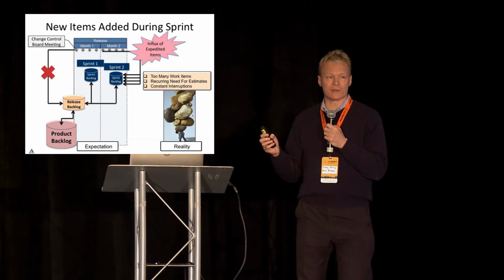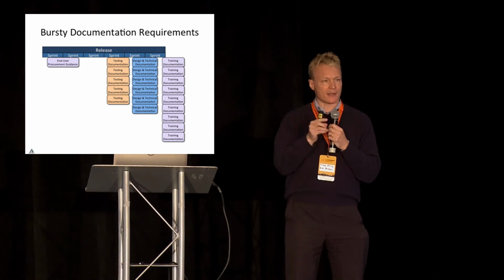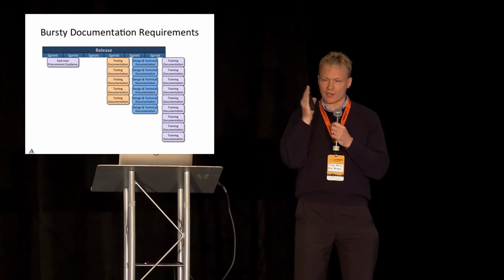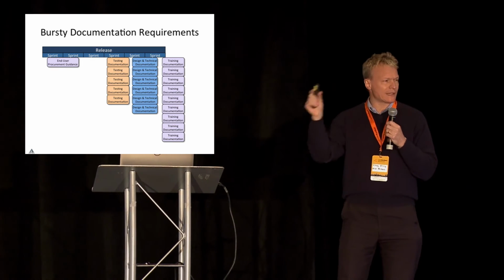So another problem, we noticed that the documentation requirements were not steady across every sprint. In fact, they were very bursty. There were certain times that certain documentation was due, and they didn't really fit exactly into sprint boundaries.